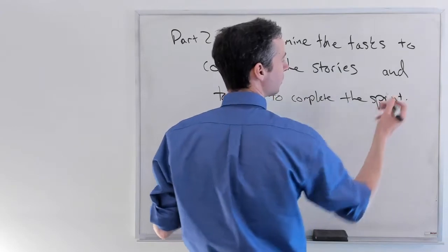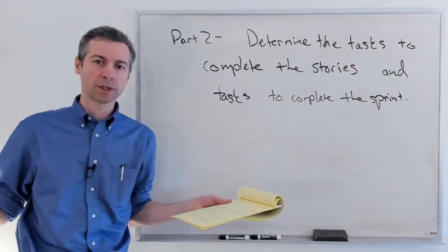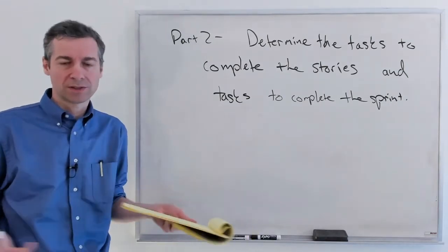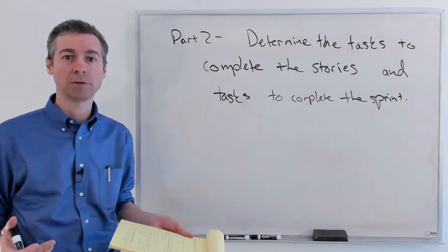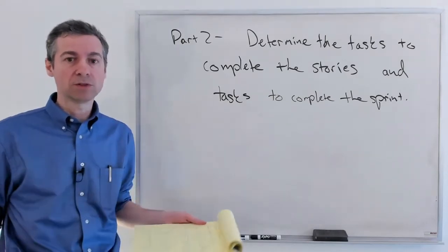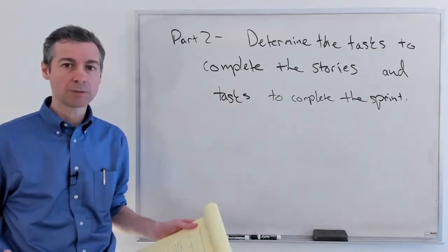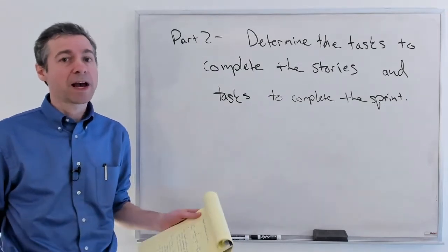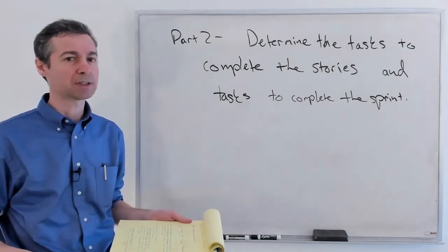So for example, in Sprint 1, you guys don't even have a shared repository yet. That's a task. It's not really tied to a user story. Someone needs to go and make the shared repository in GitHub. Likewise, someone's going to need to run that Rails new command with all the correct options and the name of your product and get it committed to the repository. That's a task. It doesn't really fit under any particular story, but you know it's got to get done.